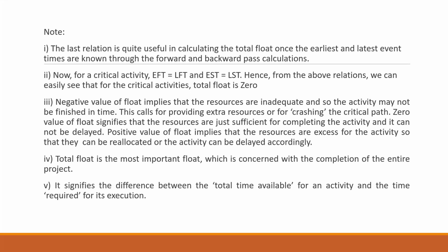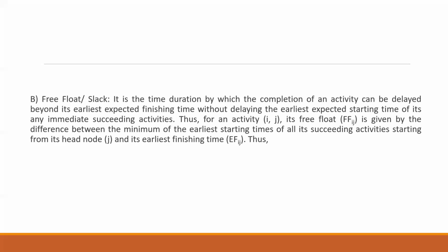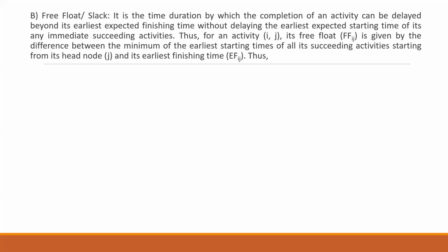Let us see the next one, your free float. Now, what is a free float? It is nothing but the time duration by which the completion of an activity can be delayed beyond its earliest expected finishing time. Here we are talking about the finishing time without delaying the earliest expected starting time, so without delaying the starting time of an activity.